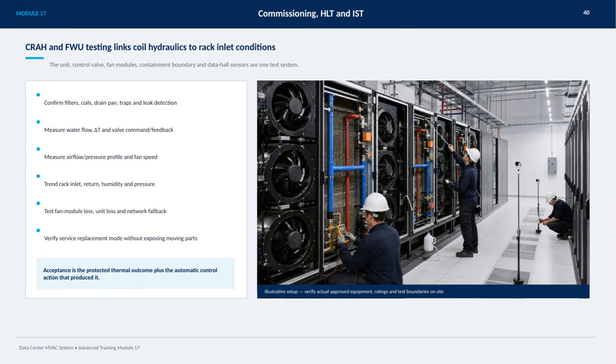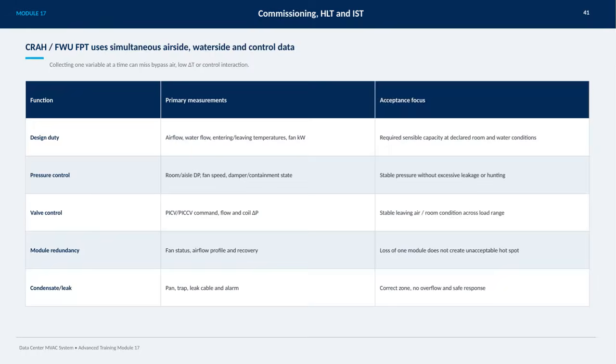Another crucial aspect is verifying the service replacement mode works properly without exposing any moving parts, enhancing safety. Ultimately, the acceptance criteria hinge on achieving the protected thermal outcome, combined with the automatic control actions that delivered it. Finally, the setup must be verified on site to match approved equipment, ratings, and test boundaries to ensure everything conforms to specifications.